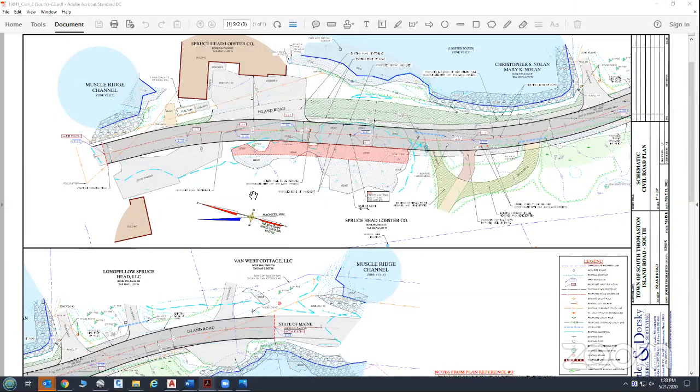The contractors are used to working on roads, so they know how to manage traffic. They would maintain one lane of access. A lot of the road construction that you see done in locations that you can't reroute traffic, we don't have any way around. We can't utilize other roads. On the Village Road intersection, it gives us a little flexibility there. But for this, I would envision that they would leave one lane open that would be on the existing road. They would work on one lane of the new road and build that up. And basically, they build them in sections.